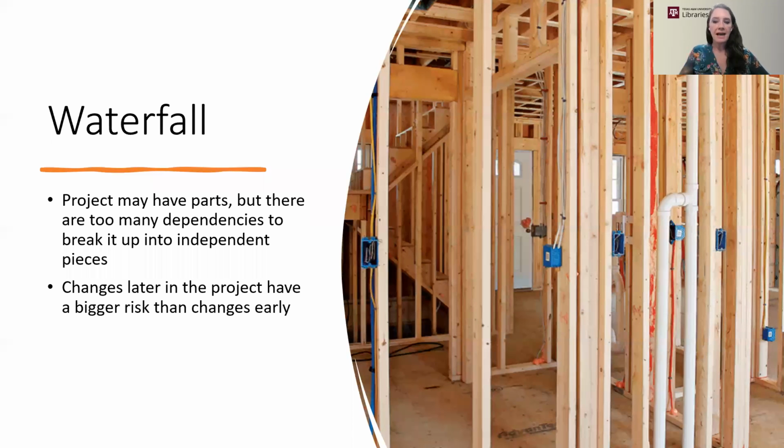For example, if you added a room onto a home, if you added it onto the plans before you even started pouring the foundation, that's fine. It is going to cost more money, but it's not a massive risk. But if you're already done with the house and then say you want to add another room, that's a whole other issue. All of the people in building equipment and things that did site preparation, foundation pouring, electrical, plumbing, they've all left, and it's going to cost a lot more money and a lot more time to get them back to add another room.